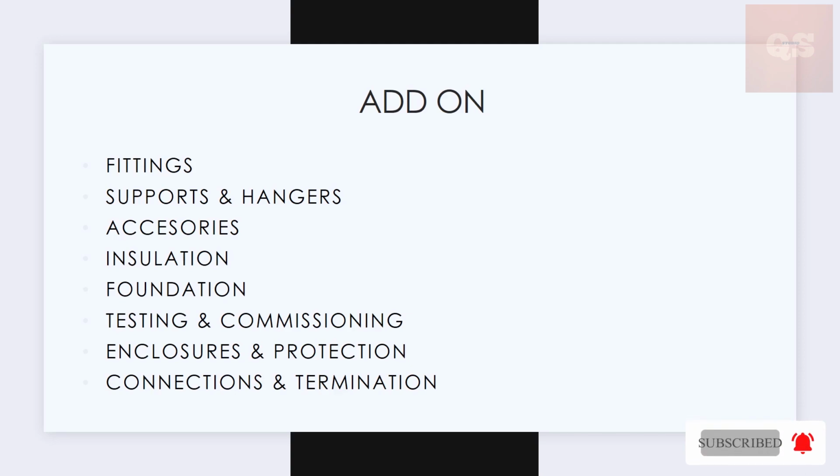There might be some method of installation document provided among the project documents. It is also called the method statement. It has all the details of how all items need to be installed properly, what all needs to be carried out for the proper installation of that particular item. So make sure to include all the add-ons inside the BOQ description so that there is clarity.